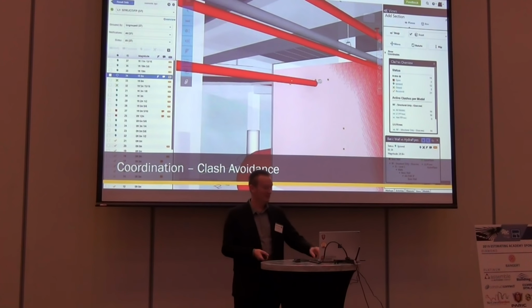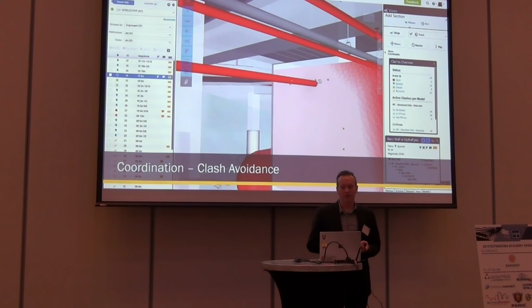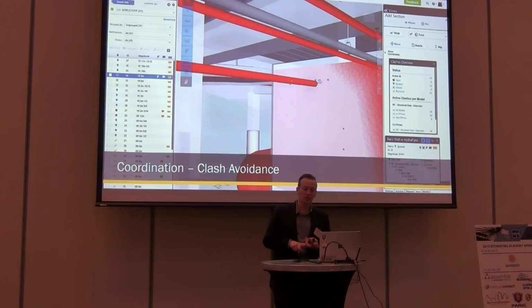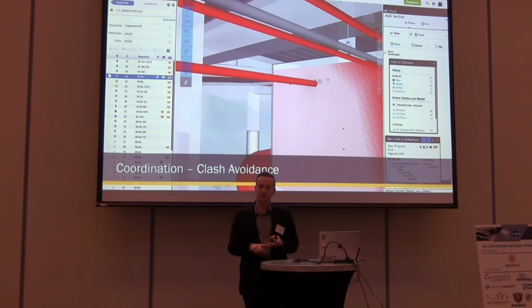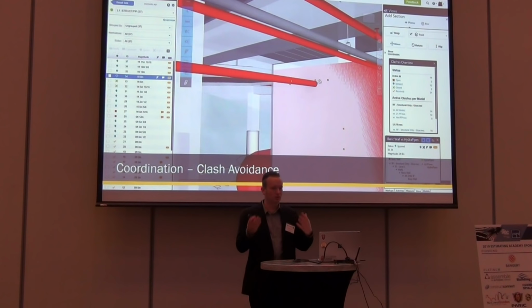Because I don't estimate, right? I rely on people who actually know how to estimate really well. But if our design changes and now we have to modify the floor-to-floor height, or our spans, or where our demising walls are going to be, or what type of spacing we have on studs, we go from 16 to 24 inch, or something like that. And that is stuff that takes a lot of time to crunch back through.